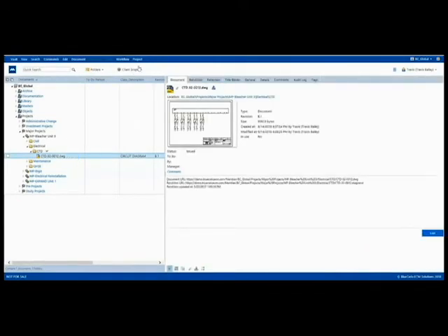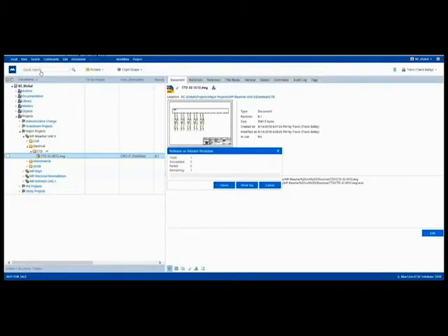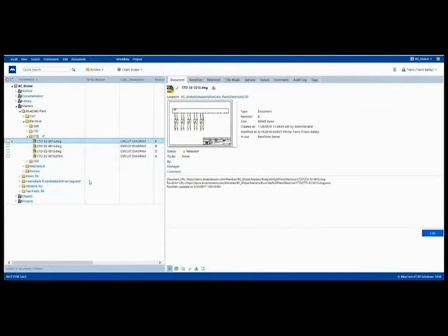And so we'll now go to project, release as master revision, because we've done our check. We merged it with the master if we needed to. Release as a master revision. So we're now back into the masters section. I can see the new drawing here.